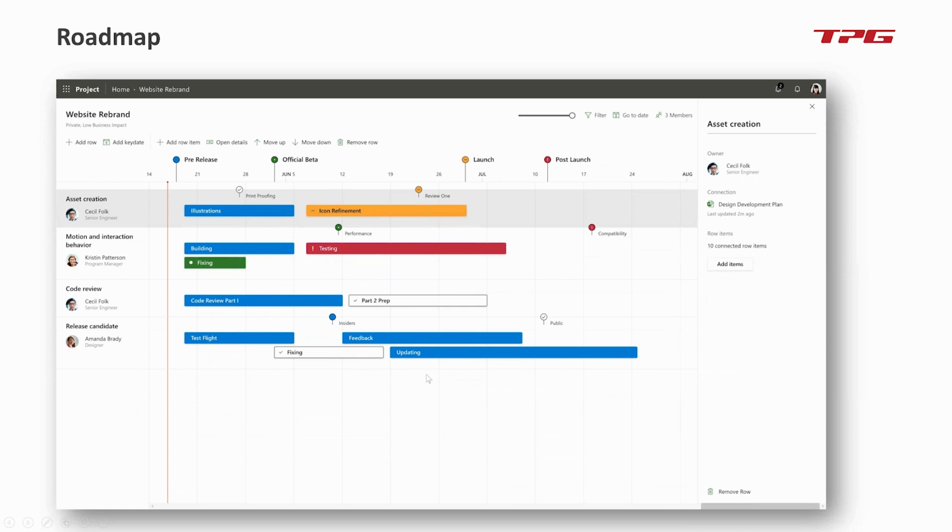I just start top-down planning, and then when I'm ready to start the detailed planning on the scheduling side, I'm connecting these phases or these projects to the detailed schedule in the system at the back end. And then it will be updated directly from the detailed planning. And the source for these different roadmap items can be a Project Online system, an Azure DevOps system, so Visual Studio Team Services as it was called in the past. It will be possible to connect the Jira schedule to it.